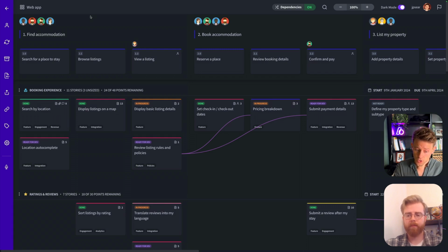And you can map experiences and a backbone at quite different levels. You could go quite high up and think of the real true customer experience, and that can be legitimate in a story map. You could go maybe a level down and map more of a user journey throughout a product, or you could actually go a level further down from that and map just a pure product experience. All of them are valid and legitimate, but it's when you mix them up that this becomes less valuable.